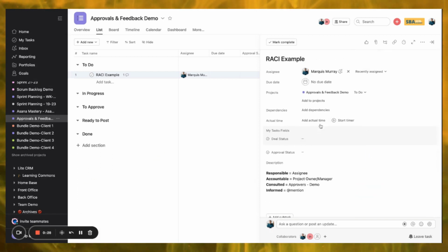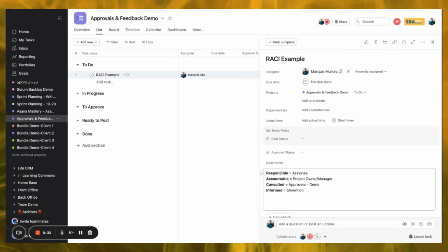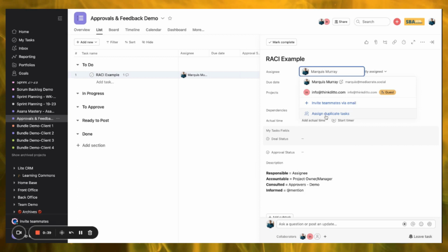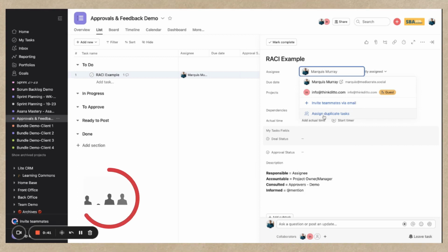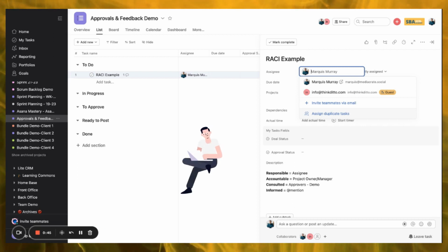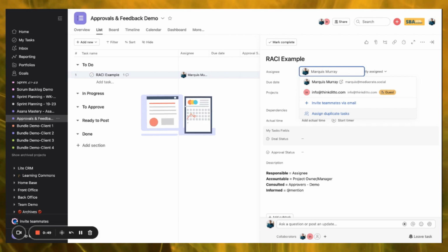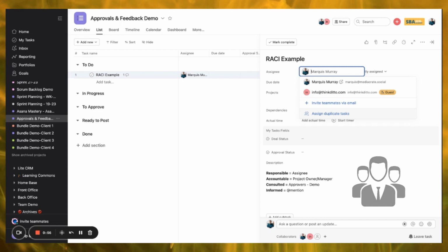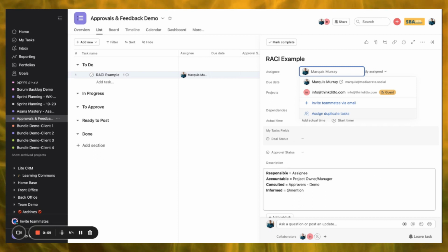So following Asana's basic breakdown of features, we have one person who's always responsible. That is our task assignee. So that will be the person that's assigned to the task, and you'll notice that Asana does not allow for multiple people or assignees per task. We believe that one person should be responsible to complete said task. You can assign duplicate tasks if you have a more complex task that needs to be broken down into different stages and you need multiple people to help complete that task. But that's what that typically looks like.